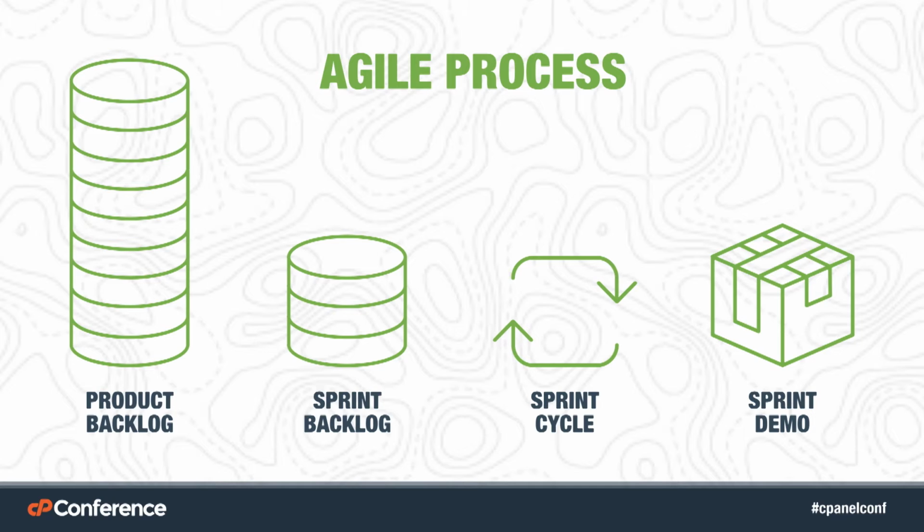The Scrum Master, similar to a product development team, is responsible for making sure that the process is being followed and that the team is holding up their end of the agreements and following the Agile process. They also make sure that if there are roadblocks or impediments, if there's stuff that they're waiting on that they can't get from external people, the Scrum Master is the person that goes out and says, hey guys, we're waiting on this so our team can finish what we've promised our stakeholders. Can you get that to us? That way the team's not bogged down with the politics and the back and forth of trying to get everything they need to do the work. And this lets them just focus on the deliverables and getting their work done.